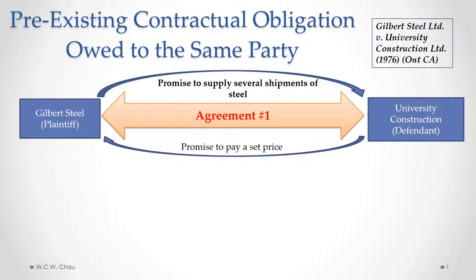So Gilbert Steel had promised to supply several shipments of steel at that set price. Now, after a few shipments had been made, the world price of steel had gone up. So Gilbert Steel went back to University Construction and told them about the increase in the price of steel to see if University Construction would be willing to pay a higher price for the remaining shipments of steel.